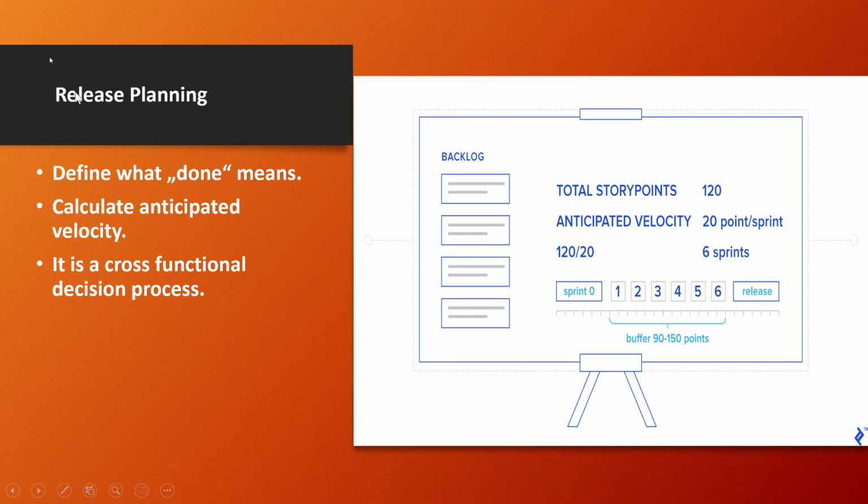So that's the release planning part, where we need to calculate this number. And now that we have this number, we can multiply it by the company engineering hour rate, and then multiply it by the total time that the project is going to be invested in. Then at the end, we have our projected cost for the project.